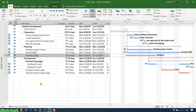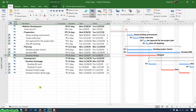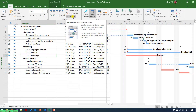So how to disable a task in Microsoft Project? You just go ahead and select the row of this task — this is number 10. And then take a look into the menu. Under the list of tasks, we navigate to the Schedule section, where you can find the Active or Inactive option for selected tasks. This function will help you make some tasks inactive — they remain in the project but no longer affect the schedule or resource availability.